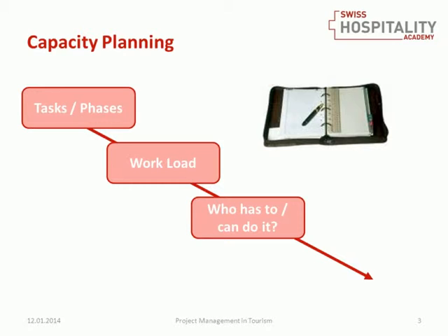And very important, you have to identify critical elements. Critical elements are the points that could crash down. So for example, somebody is overloaded with work. Okay, we can say to this person, during this phase you have to work overtime. But if this is especially the high season in the hotel, or maybe the Christmas season in the Western world where everybody wants to be back with the family, you do not create much motivation if you give somebody overwork in this phase. So we need to identify these elements and think about how to change this.